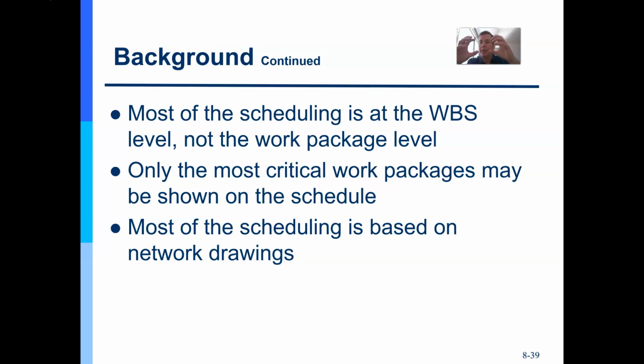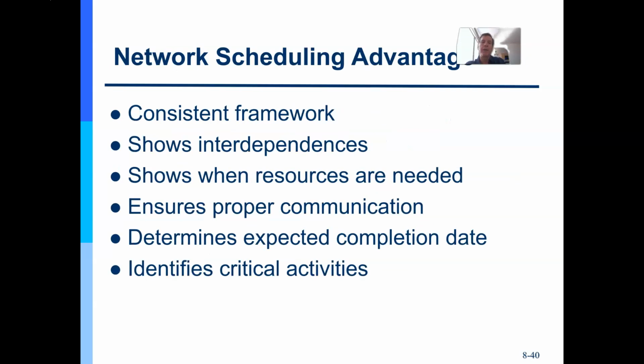I need to deliver those in my work breakdown structure, that's scope. But now I need to go out as an activity and purchase the materials. I need to assemble the materials. Those are activities that support building that work breakdown structure work package. And so once you get all those activities, you'll come up with a network schedule, right?